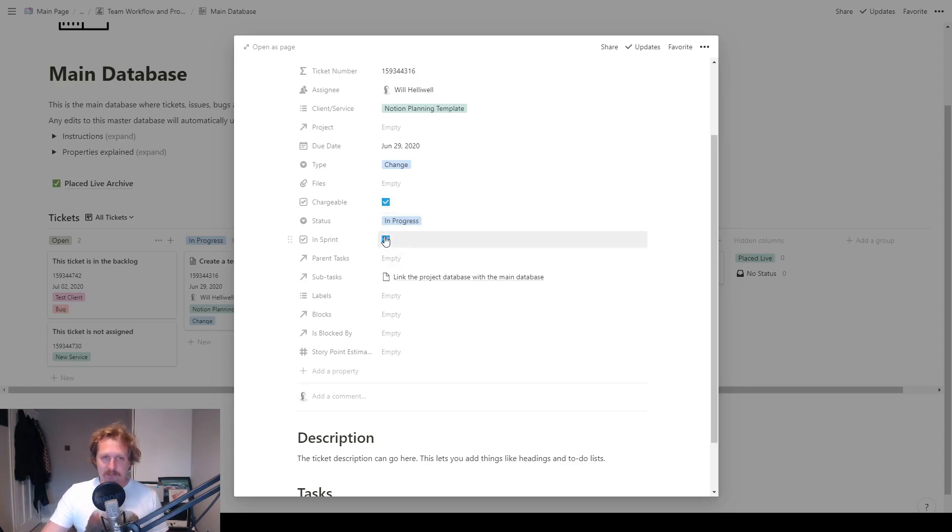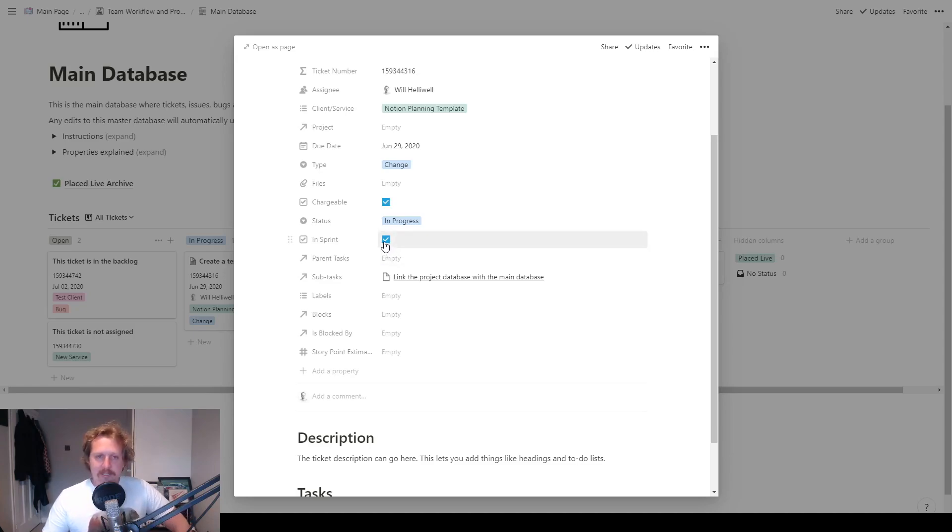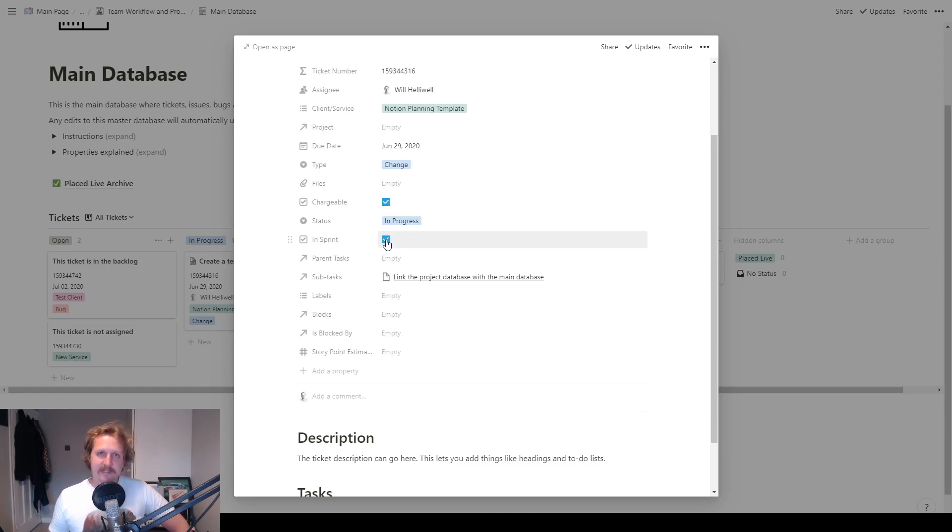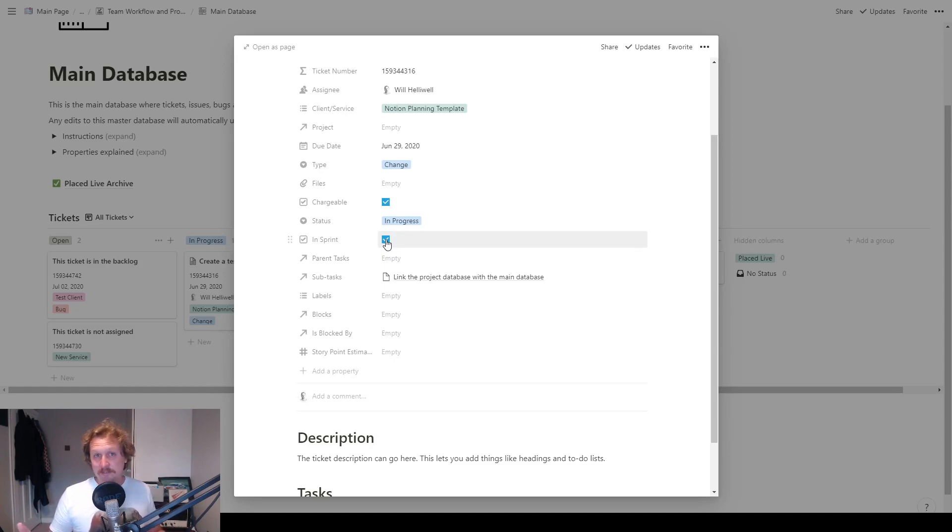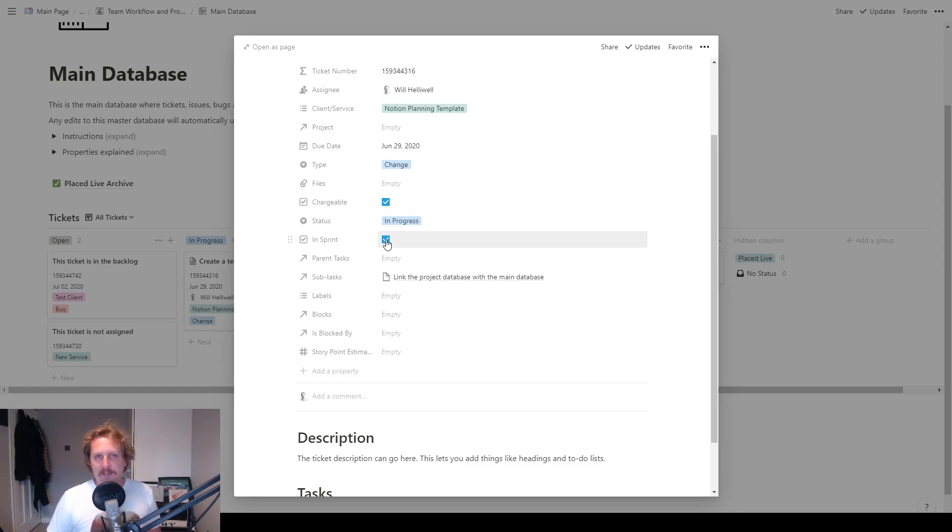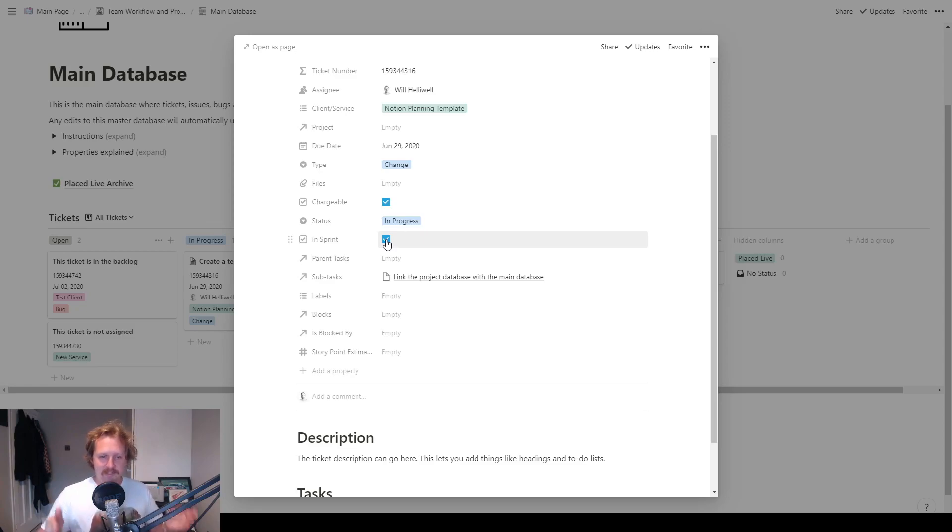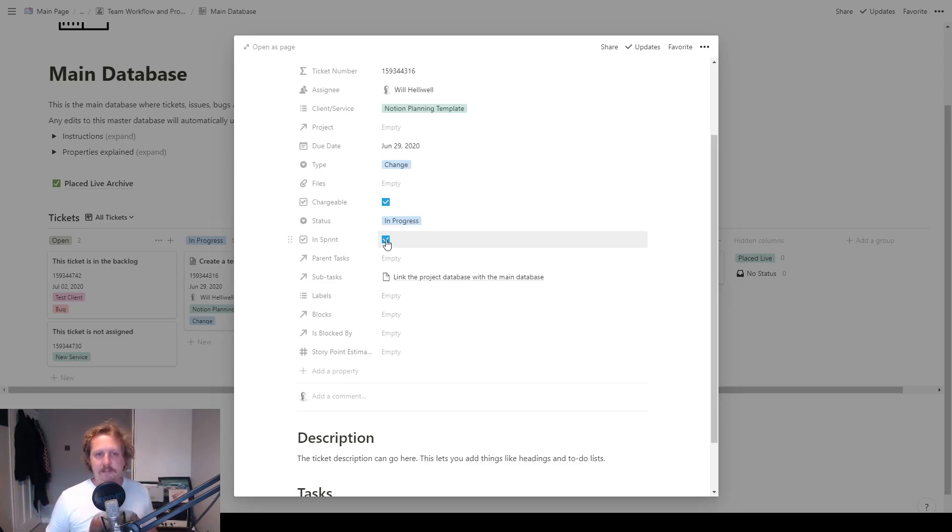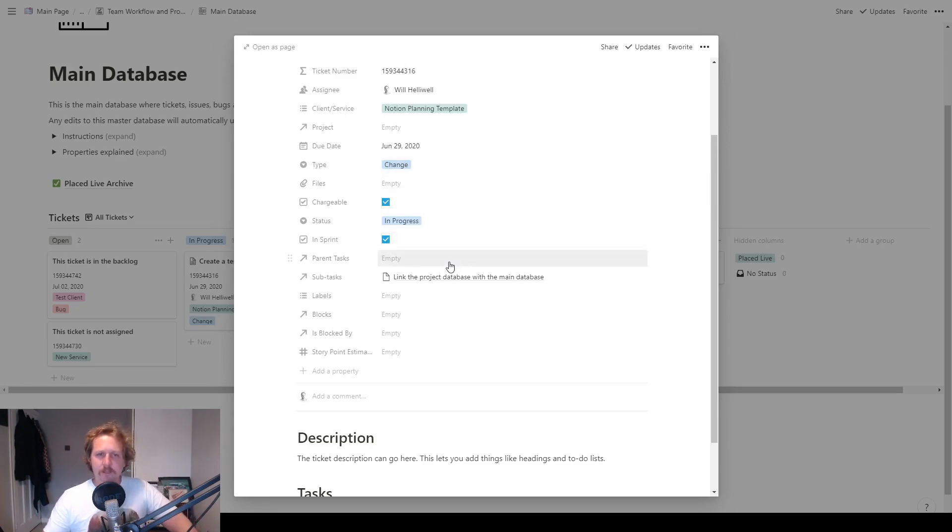In sprint. So this bit, I will explain in a bit more detail in a moment. But this adds, if a ticket is in the sprint, it means it's in your current sprint's workload. So a sprint can be like a week of work or a month of work, whatever you decide as a team. And if this ticket is in the sprint, it means I'm going to be focusing on this ticket inside this time period. So I usually work in weeks. So this ticket, I will be focusing on this week.